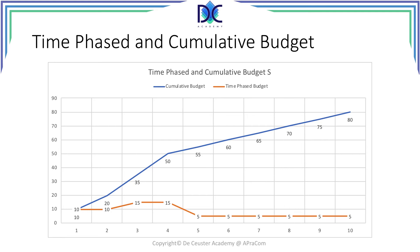It's just a name people gave because of the general appearance of the cumulative budget curve. Both pieces of information are shown in the same graph — the time-phase budget and the cumulative budget, or the S-curve. The blue is the S-curve and the orange is the time-phase budget.